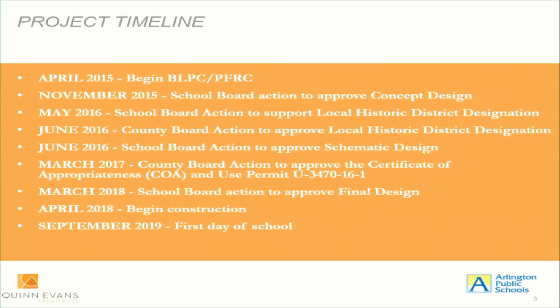And then exactly 1 year ago this month, we had the use permit approved by the county board. More recently, we conducted a meeting with the BLPC at the end of February, and there is a mistake on the slide there. The date for school board action is anticipated at the next school board meeting, so that would be April, and we'll be starting construction directly thereafter.